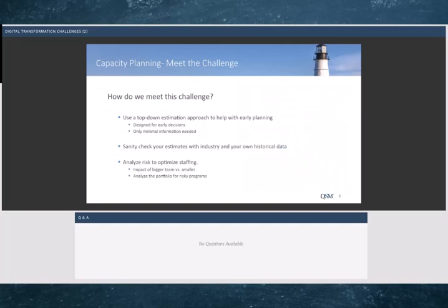How do we meet this challenge? Well, at QSM, we have a digital transformation practice and a consulting practice that's been around for a long time. So in addition to talking to customers, I also talked with some of the consultants at QSM, kind of to hear what their day-to-day challenges are that they hear about on a day-to-day basis. And how we meet these challenges is we use a top-down estimation approach to help with the early planning, right? Top-down estimation is designed for early decisions, and only a minimal amount of information is needed.